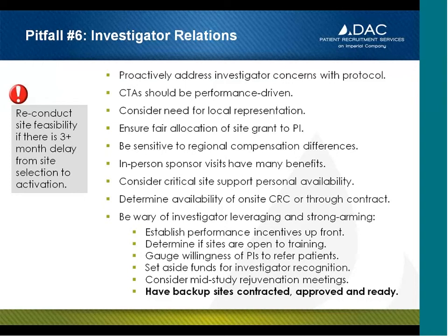Discuss the time out of the clinic with PIs and staff, which also includes academy meetings and industry conferences, at the time of feasibility. This establishes early and reasonable expectations for enrollment and site performance before a site is selected. Investigators are human, and they experience illness, unfortunately, and sometimes even tragedy and death during their studies. So be prepared. Don't put all your eggs in one basket, and make sure you have a contingency plan.